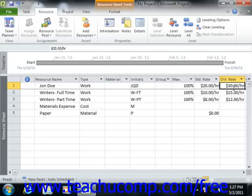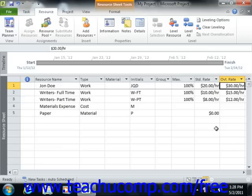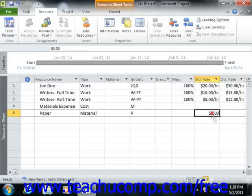For material resources, you can enter a rate based on the use or consumption of the material resource. Many times this information is entered into the cost per use field, although you can also specify a standard rate for material resources if needed.